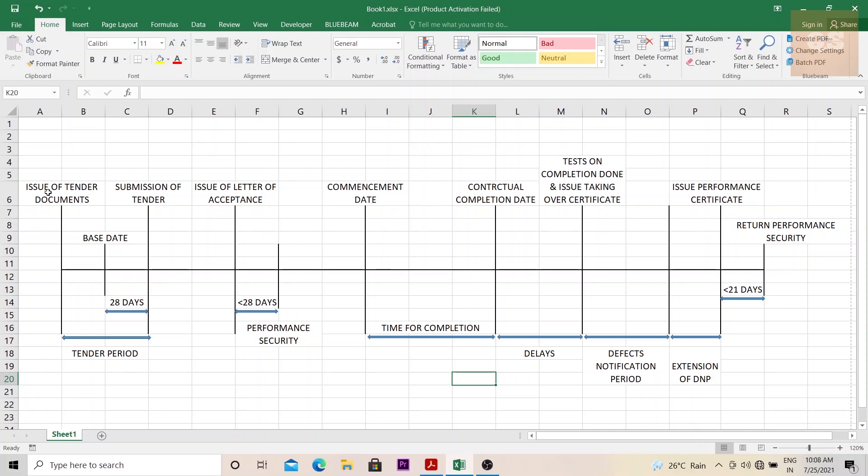It all starts with the issuance of tender documents to the different contractors. The client or the employer, as the FIDIC suggests, is the one for whom this project is being made, and they issue tender documents to different contractors who will be competing against each other for the best price that they can quote. I have already explained the different tender documents in another video, the link to which will be shown on the top right corner. You can click on it and understand the different tender documents.